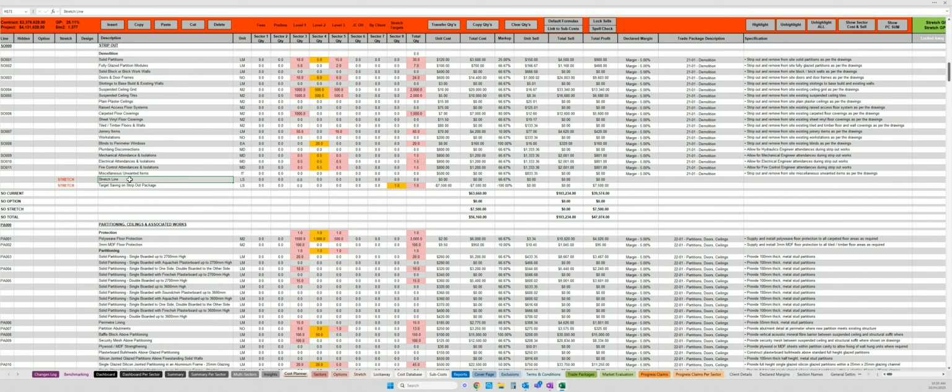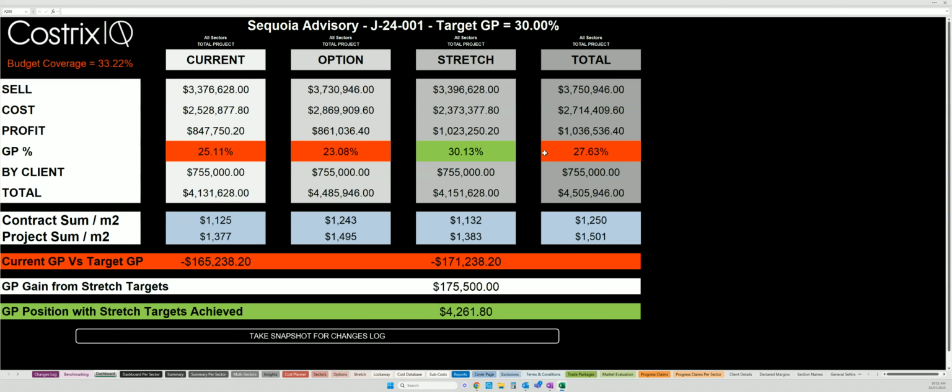Now, stretch lines are completely internal profit planning lines. They are not included in any external reports. So you do not need to hide them, and you can't hide them. Just understand that a stretch line is already hidden. They do not appear in any type of report. And also in our system, stretch lines are analyzed and reported uniquely, so they don't interrupt your analysis of above the line items.